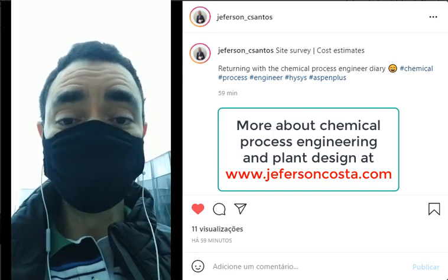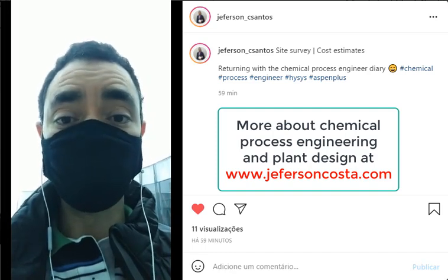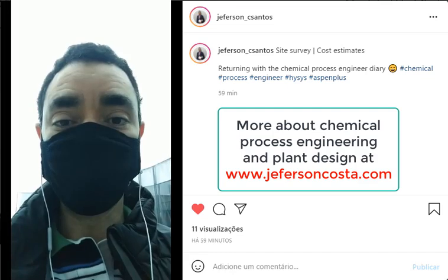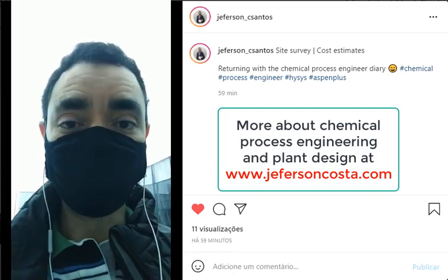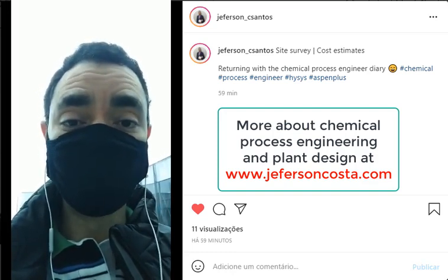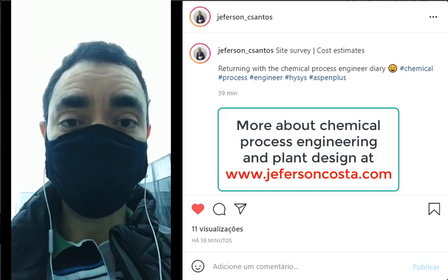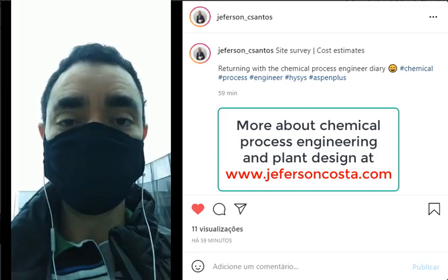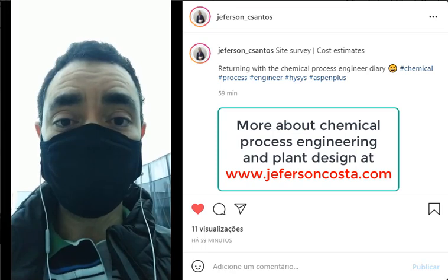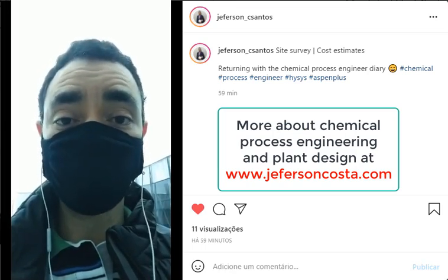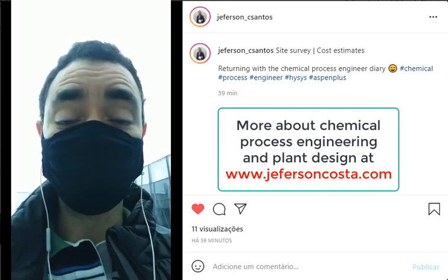And so, usually using the front-end loading methodology, we have one range of accuracy for FEL 0, another for FEL 1, 2, and 3. In FEL 3, we are supposed to do the basic engineering design of the project, and with the basic engineering design, we are able to get quotations from manufacturers and vendors, and that leads to a very small range of variation in the project.